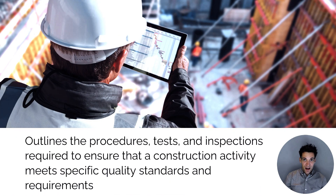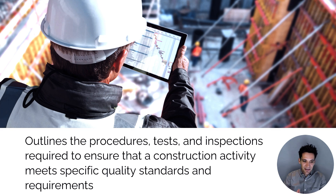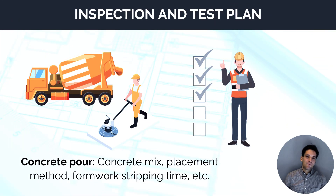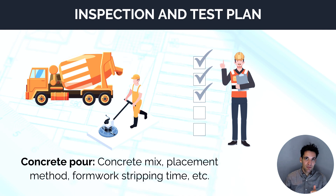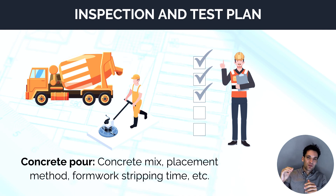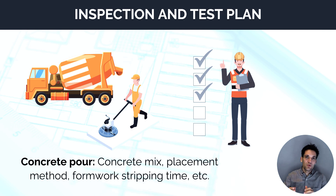An inspection and test plan, or ITP for short, is a document that outlines the procedures, tests, and inspections required to ensure that a construction activity meets specific quality standards and requirements. So if we think about pouring concrete foundations for a building, there's a series of activities involved — ordering the concrete, setting up a concrete pump, placing the concrete, finishing it, and checking it's all been installed correctly. The inspection and test plan documents all these steps and checks what could possibly go wrong and how to verify it's done correctly.